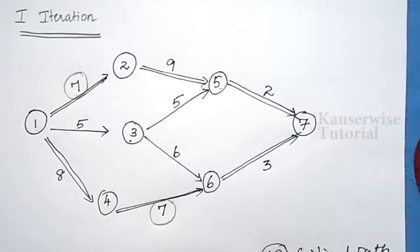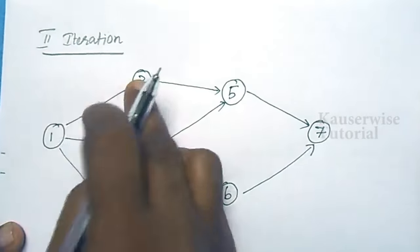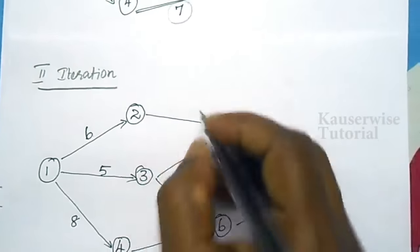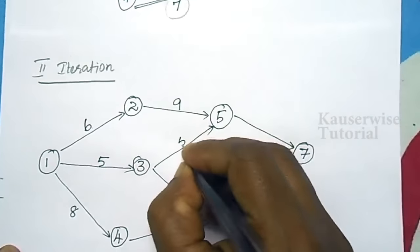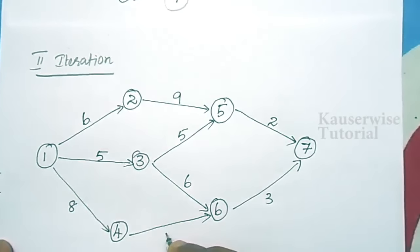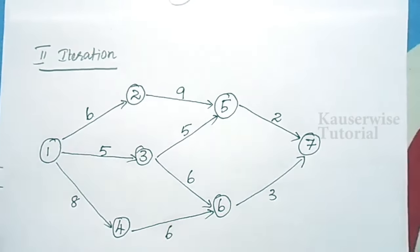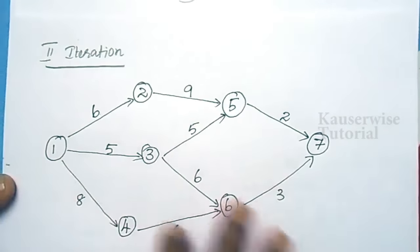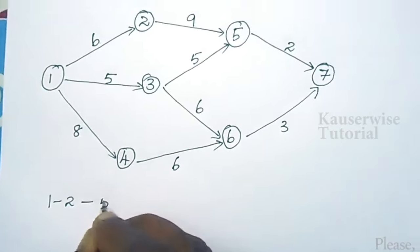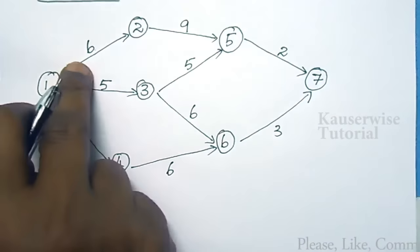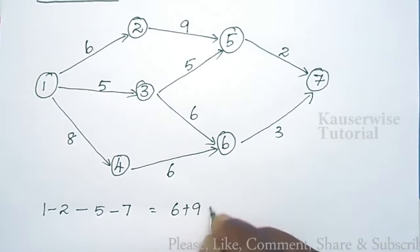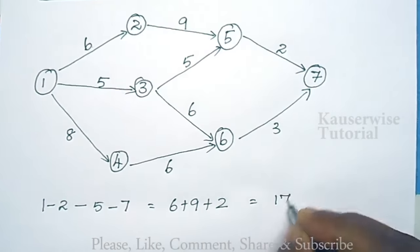In the second iteration, for the first activity (1-2), duration is 6. All other durations remain the same: 5, 8, 9, 5, 6, 2, 3 — except 4-6 is now 6. The possible paths are: 1→2→5→7 with 6+9+2 = 17 weeks.